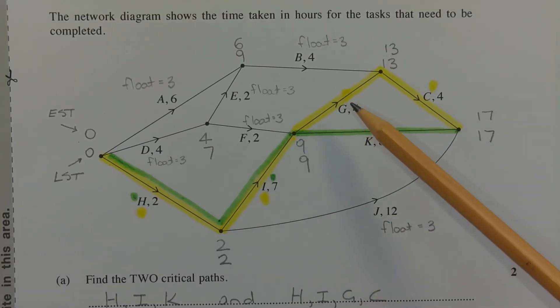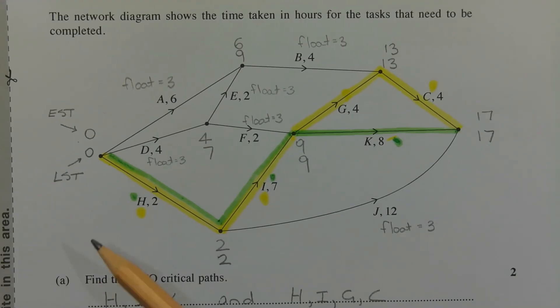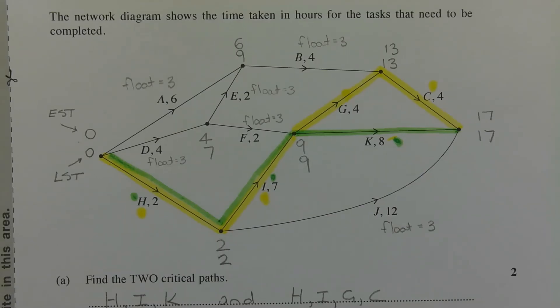In other words, if we chose, let's say, activity G and reduce that by three hours, that's all well and good for the critical path that's marked in yellow. But the critical path that's marked in green will still take 17 hours, so that does not help our cause. And for the same reason, activity C cannot be reduced because it does not affect the critical path that's marked in green. We have to choose either activity H or activity I to reduce, and it can only be one or the other. It can't be a combination of both.